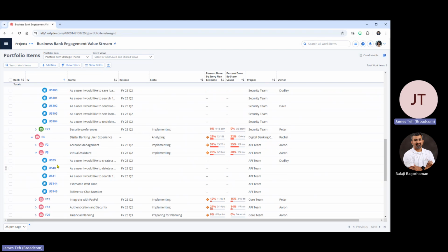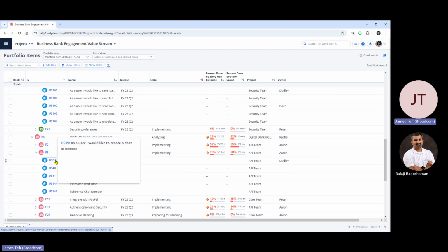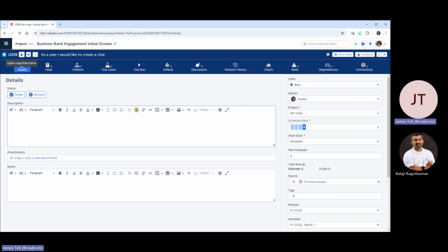Okay. Now, I'm going to drill down into a user story, right? So for example, I can click this and go into a user story. So this is where a team member can complete a user story with descriptions. They can also put in test cases, and that can integrate with your test management platform, right? And then run the actual test and then bring the data back into Clarity, right? So through these test cases and test run functions, I can even automate the testing or schedule the testing and then bring the results back into Clarity, or back into Rally, I should say, to update the statuses.